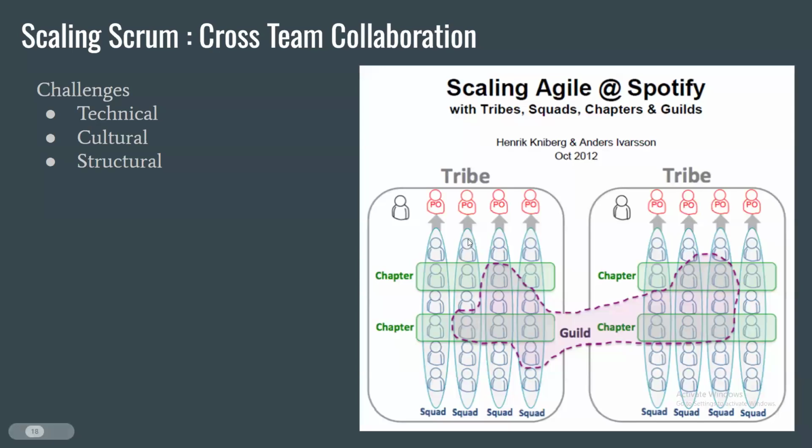What we do in this mechanism is we have a product owner and we create what they call a squad. It's basically your Scrum team. They gave it a name, a squad. In this one, we have front-end developer, back-end developer, QA, whatever is required for this product team to function. And they will own one very clear area of the product. Like if we are talking about an Amazon-like online shopping product, then maybe they are responsible for the shopping cart, or maybe they are responsible for showing the product details page, right?